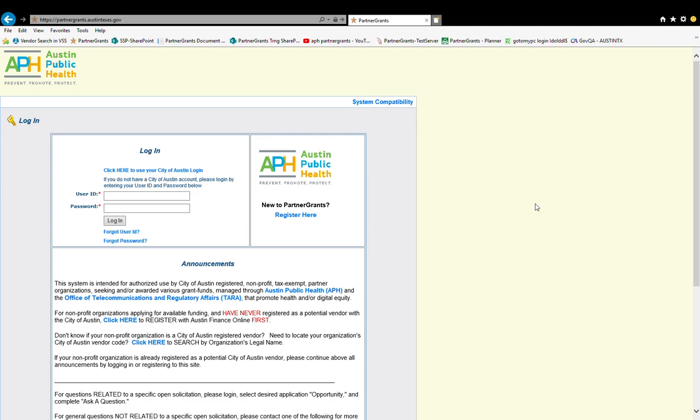Either task must be completed and submitted as soon as possible, but no later than 60 calendar days following the end of its respective term. In the event of a progress report, this would be 60 calendar days from the project term end date. If this is a contract closeout report, it would be 60 calendar days from the contract end date.